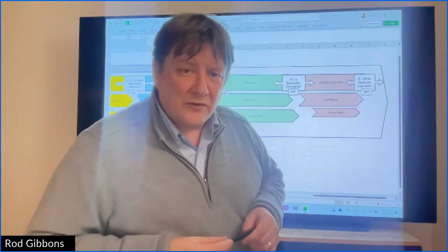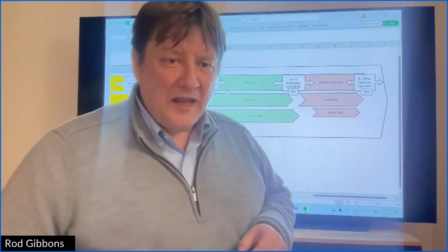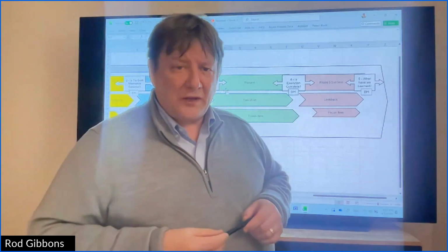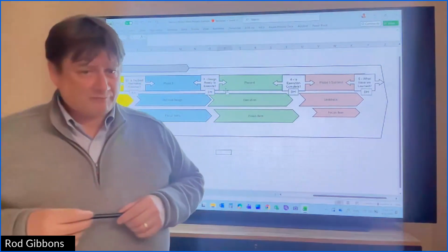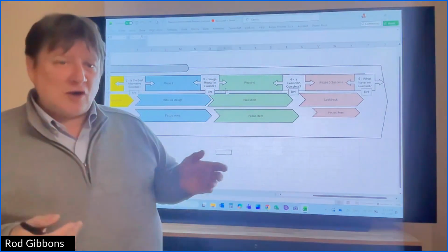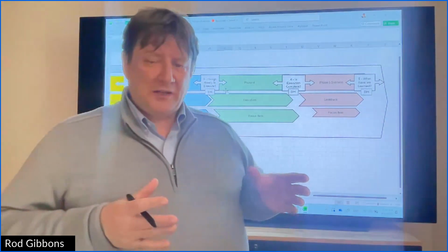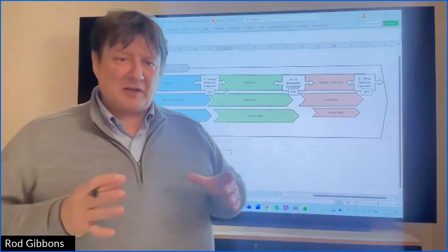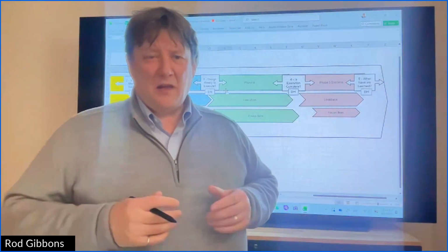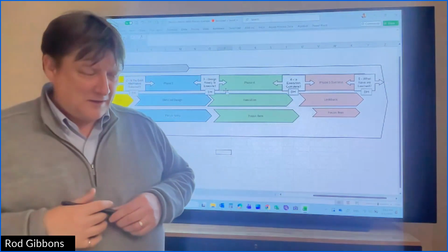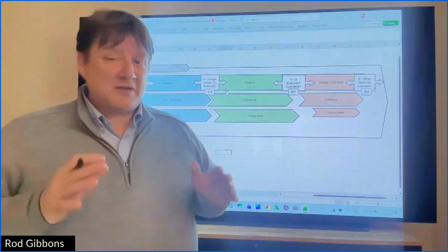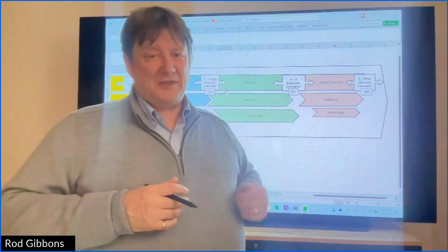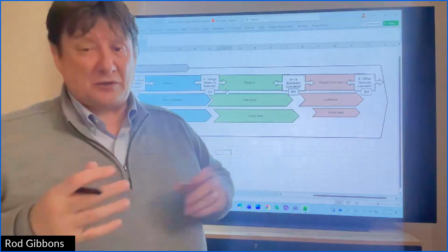I see a question in here. Is the same person or group responsible for decision making in every phase of the oil industry process? I would say yes and no. On smaller projects, the same person can be responsible for decision making, but for most projects, say in the millions or billions of dollars, it's almost never the same person or group for each one of these decision points.